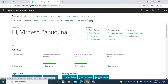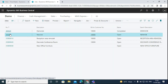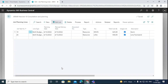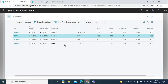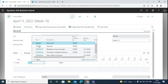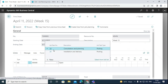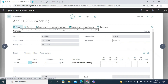We can go to the job section, click on our job — new job — and navigate to the planning lines to see how many hours the resource has worked. Now we can enter on the timesheet how many hours the resource has worked for us. The line type will be job. We will enter the job number, the job task number, and on the 13th Kevin worked 5 hours on the job. Now we can go and submit this timesheet for the manager to approve.